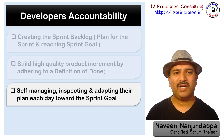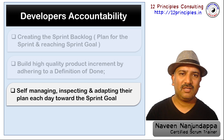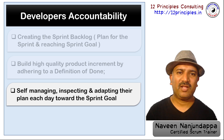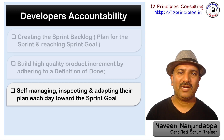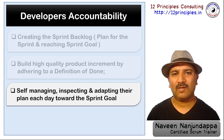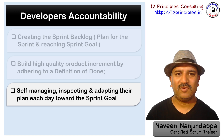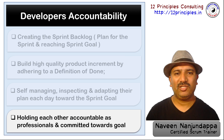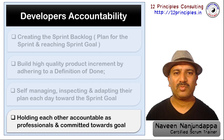The team members self-manage their work. They inspect and adapt their plan every day towards the sprint goal, so that if there are any corrections that need to be done during the sprint, they would go ahead and inspect and adapt, making the necessary changes to reach the goal. The sprint backlog can be changed anytime during the sprint and the developers own it. The team members hold each other accountable as professionals for everything that is done during the sprint and towards the sprint goal.